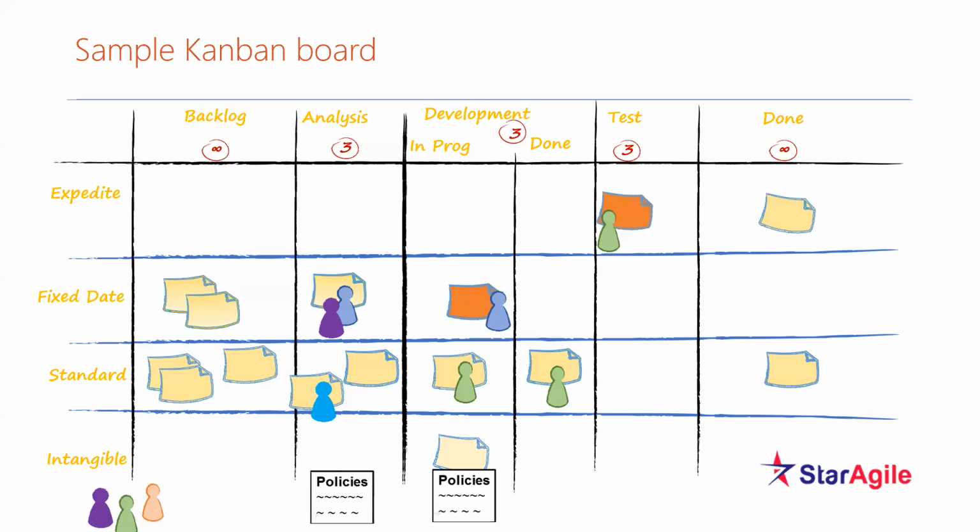No, no, it is not always three. The maximum is three. Your capacity, or the WIP limit which you have set, is three. It can be two also. If you feel that you just want to pick up two and put one person who is working on analysis into testing so that you can expedite testing, so be it. Okay, got your point. What you explained right now is nothing but a pull signal. Let's say if this particular sticky is not there, it means there are only two items.